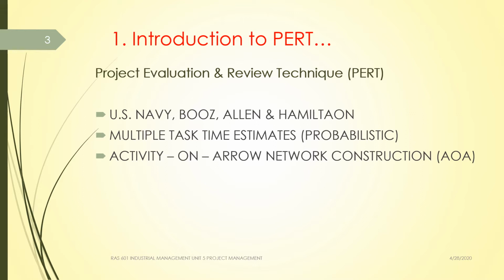The time will not be optimistic, nor pessimistic, and the average of that can be placed in a beta distribution. Beta distribution is basically a kind of distribution that helps to find out the variation within the process, that is variation in terms of time.